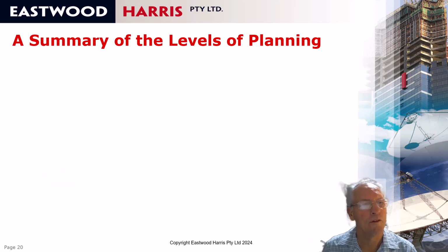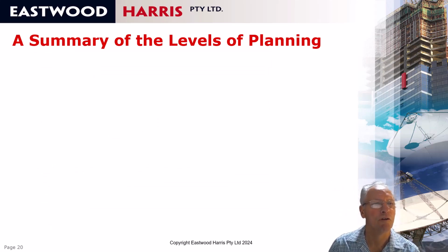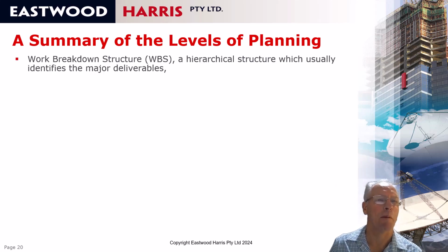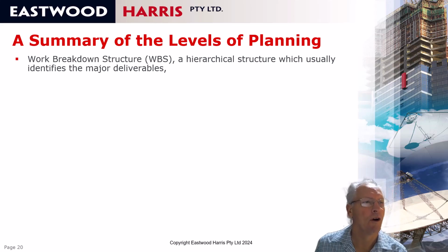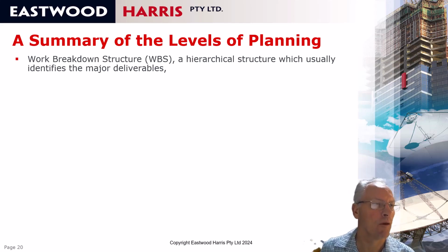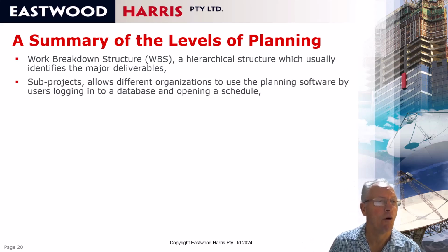Let me just go through some of the processes you might want to consider using to granulate or add more detail to your program. First of all, the WBS can be increased in the number of nodes. For example, if you've got a single node for a concrete slab at a level within a building, you might want to break that up into the northwest, northeast, southwest and southeast quadrants. So you break the original single node into 4.